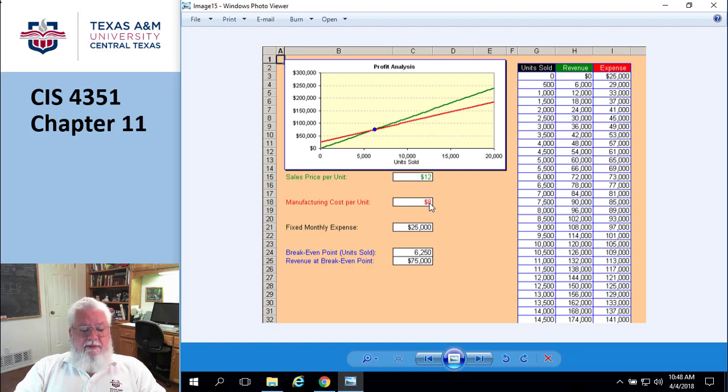All right. The next one is planning risk response on page 452. Now, there's several ways you can deal with risks. And so let's just talk about some broad classifications of risk. The first one, which is probably the most appropriate one, believe it or not, is called avoidance. Now, that doesn't mean I'm not going to talk about it. That's ignorance. We're not talking about ignorance is bliss. We're talking about avoidance. Avoidance basically means don't do that anymore, whatever it is that's causing the risk. And so back to an IT scenario.